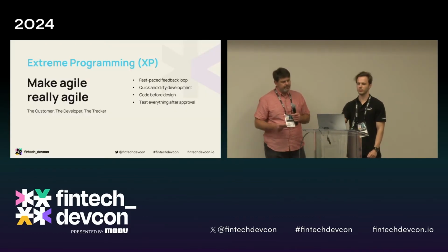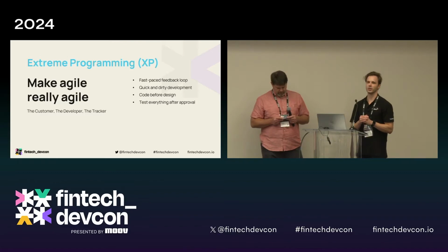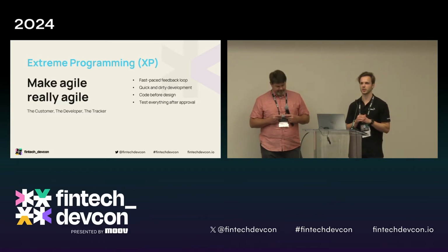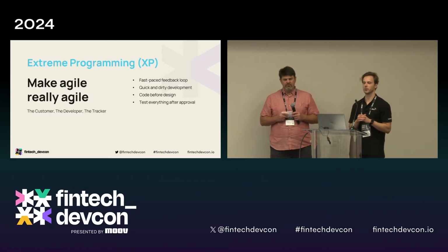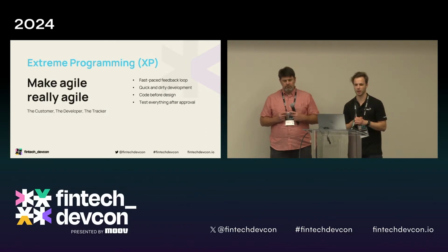Yeah, so at the beginning of the project, we used just normal Scrum methodology for the project management, and that was working for us. However, we noticed that with the demos of the software every 2 weeks, we were slow on receiving feedback from the customer, which the team could provide us.